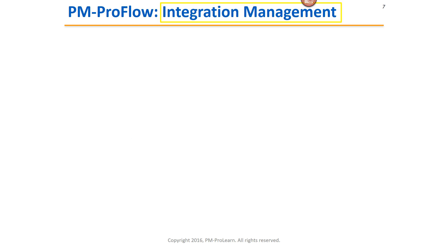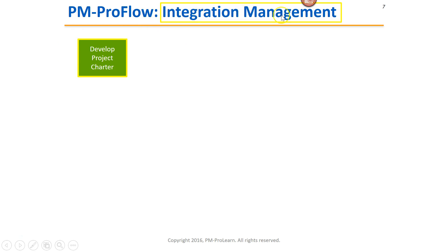So let's take a look at the flow chart for integration management. I'm going to go over this quickly — I'm not going to go over it in depth as we would in class, but I'm going to briefly show you how this flow chart works with animation in our classroom. We start out the integration management knowledge area with the process called Develop Project Charter, and note that it is highlighted in green to show that this is an integration management process. Other processes on this page that are not part of integration management will not be highlighted.